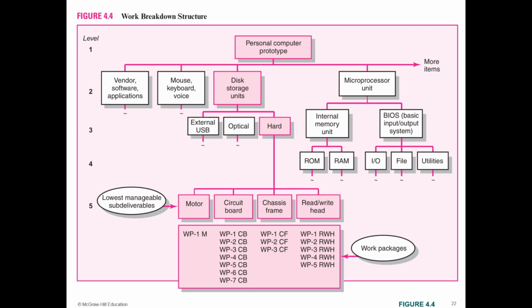Here's another example that shows a simple WBS for the development of a new personal computer project. At the top of the chart, level 1 is the project and end item, a deliverable, product or service. Note how the levels of the structure can represent information for different levels of management. For example, level 1 information represents the total project objective and is useful to top management.